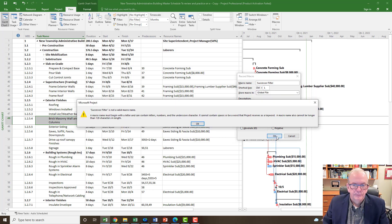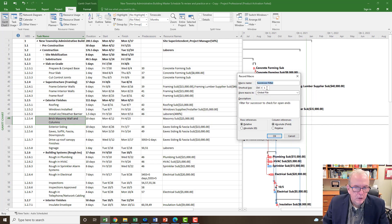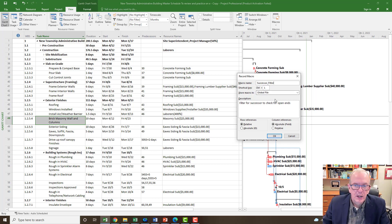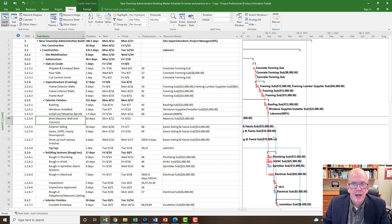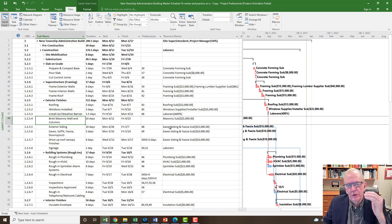I'm going to click OK. It says a macro name must begin with a letter and contain letters, numbers, and the underscore character — it cannot contain spaces or be a word that Project uses as a keyword. It gets fussy when you pick a control letter, so I need an underscore and a number in there. Now I've clicked OK and it's running the macro — it's going to record all the steps of everything I do. I want to filter out headings, show the Successor column, and filter to show only blank successors.